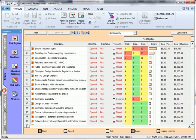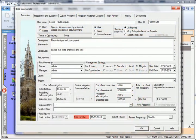Typically, your choices for risk management strategies are accept, transfer, mitigate, or avoid for threats, and accept, share, exploit, and enhance for opportunities.